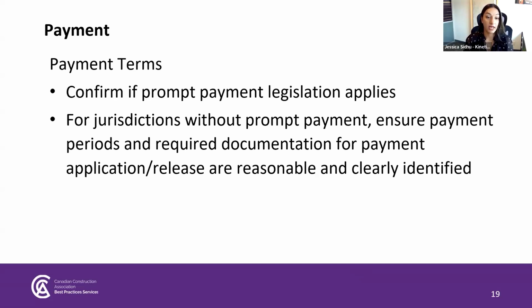So on the note of positive cash flow, terms should be set for products delivered to site but not yet installed. In some cases, the contract will allow for materials to be stored at an approved offsite facility to be claimed within the progress period for which it's delivered. However, there are typically requirements for the offsite facility to be bonded, and there may be specific insurance and documentation requirements to satisfy the terms for that deposit payment.